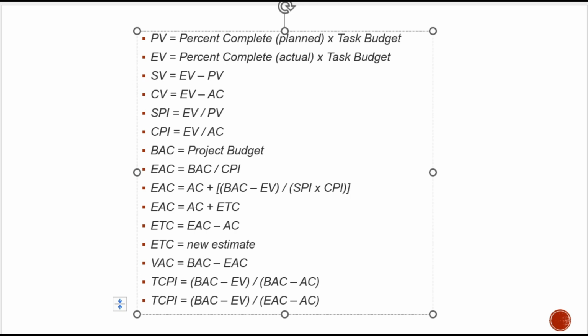That is the earned value minus actual cost. That is a negative value, minus 30,000 rupees, which means that the project is over budget. Now, what is the schedule variance? Schedule variance is 2,50,000 minus 3 lakhs. That is also a negative value, minus 50,000. That means this project is behind schedule.